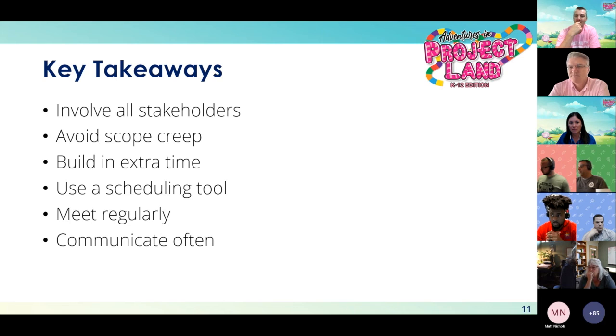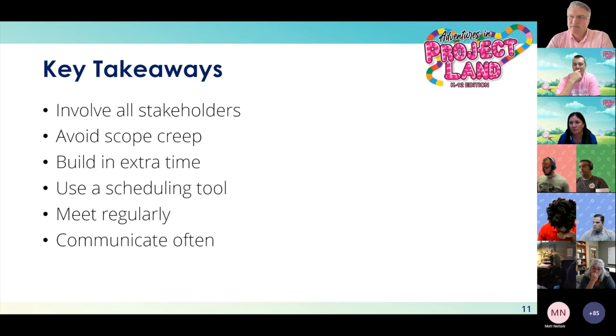Great question from Ryan. What process do you use to amend a project charter if the need arises? Yeah, I think for us, we really consider that project charter to be sort of a document in time. So I haven't experienced a situation where we would need to go back and amend the charter, but we definitely make note of any changes through our project schedule and our biweekly meetings that we have with our project team, or weekly meetings, whatever your schedule is.